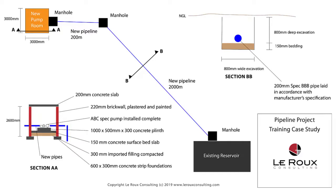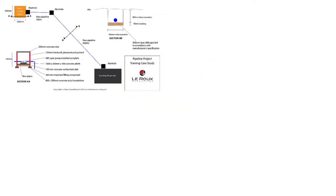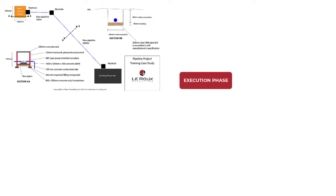It will give you a good indication of how I will implement it. But again, you might do it differently and it might be even a better way than mine. So there's no right or wrong. There's definitely better and poorer ways to do it. On the first level, the highest level of my works breakdown structure, I will have an execution phase. This is sometimes to allow for the client because they all have their own design phase, execution phase, and then maybe a closeout phase or different phases at the top that as a contractor we might not be part of.